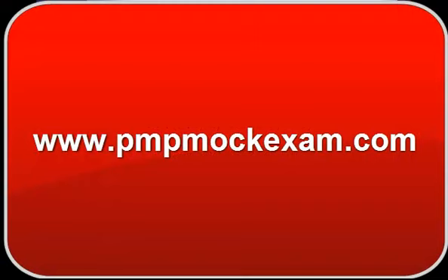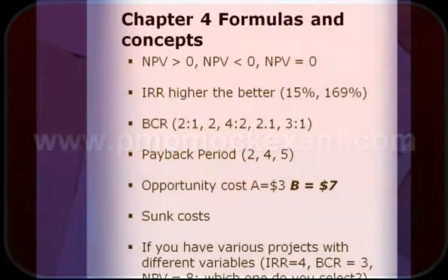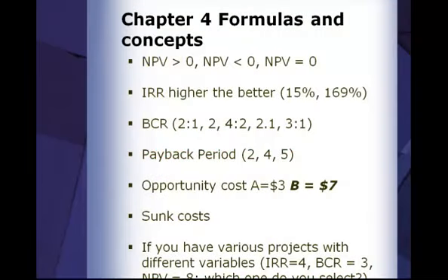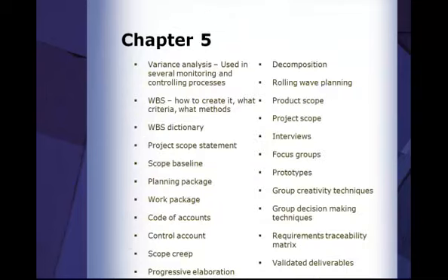If you've got a load of options, with project A, internal rate of return is 4%, BCR on another project, project B is 3, on project C, net present value is 8. Which one do you select? Always select the one with the highest net present value. That's the trick. Net present value contains the other information that we're talking about. Things like your payback period, you're already baked in there. Your internal rate of return, it's already baked in.